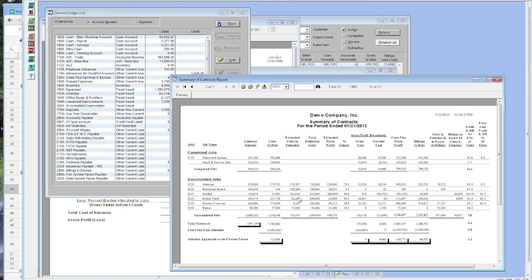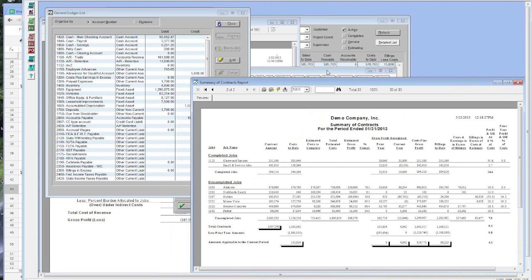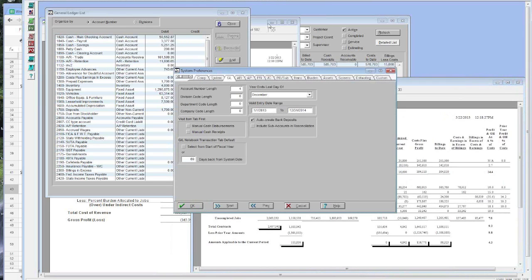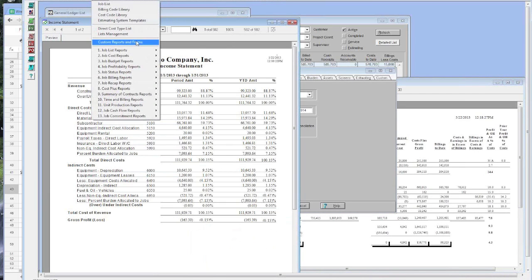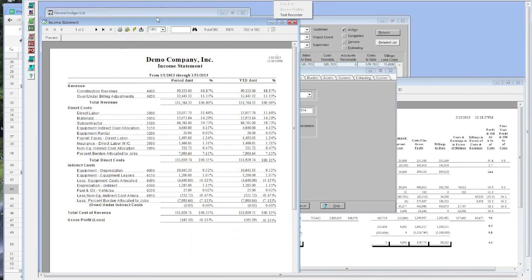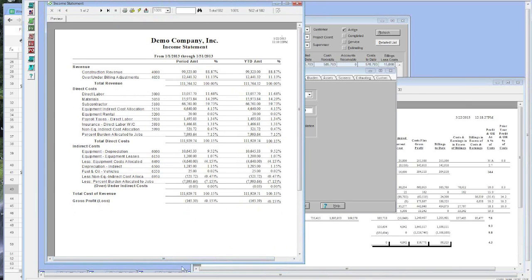On a larger job, this is what you want. You want this number to be reasonable, and you want this number to be supported by two concepts. You want your budget actual variance on your labor hours and some sort of projecting mechanism like we have in that job's job status hours report. And the second thing you want is by line item.